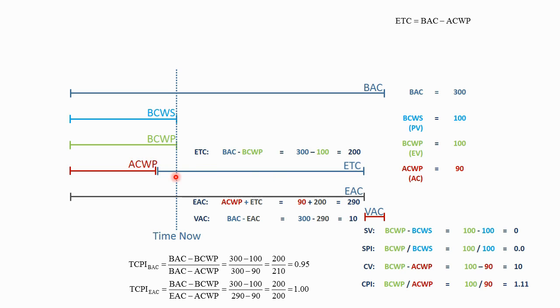If a project manager gets ahead of schedule and you let them keep that underrun, maybe they'll need it in the future. But you might have another project, if you're a business manager, that is overrunning. So at some point, if you've got a project that is consistently underrunning, you might ask them to do a new estimate at completion and a new estimate to complete that revises the estimate downward, shows a variance, so that that can offset something else that's overrunning.